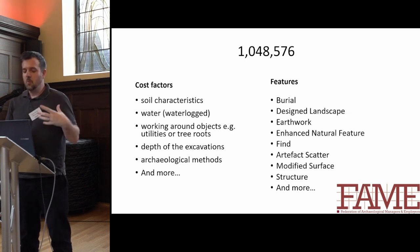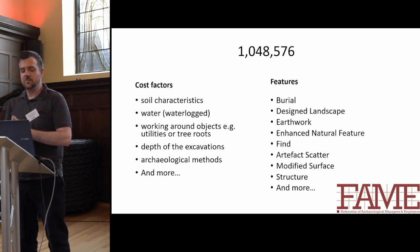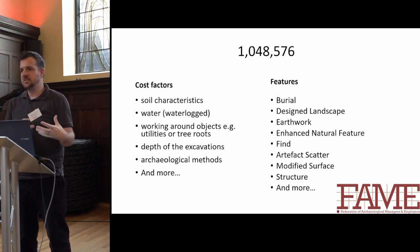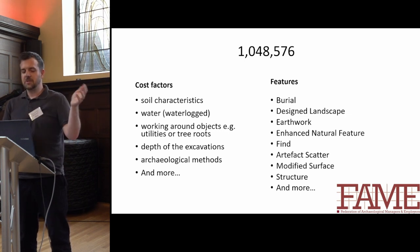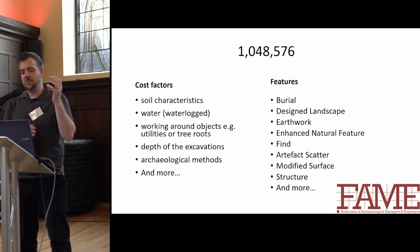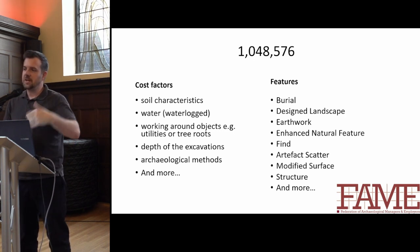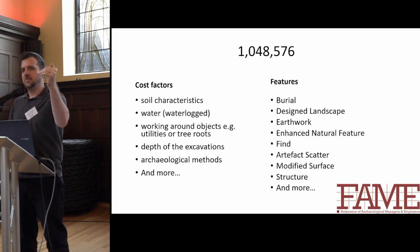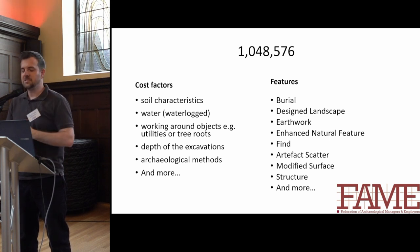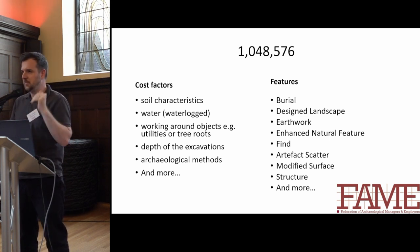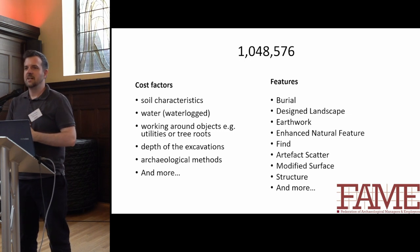So what we're building now is a condensed template, and we're looking at different conditions. In a sense it's going to be more mathematical — you put in the cost of what you estimate that condition is, you can then line those up later, and you don't actually need to enter every single line of every combination. You can just go back and calculate that out.